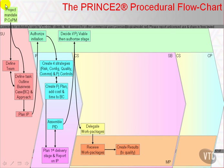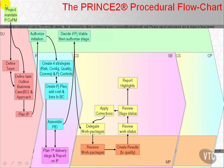Checkpoint reports in turn allow the project manager to review stage status, which in turn may require corrective actions, so delegated work packages may be amended. As a result of receiving checkpoint reports periodically, the project manager will create highlight reports to be sent to the project board.